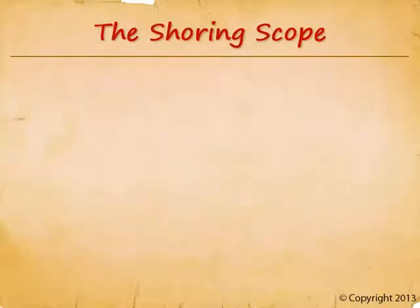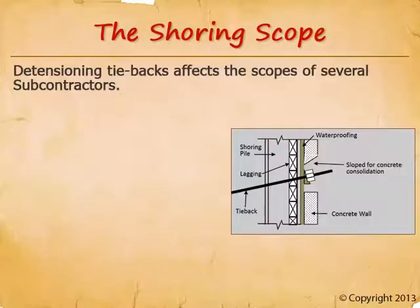Let's begin our training by talking about the shoring trade. Many cities and private owners require detensioning tiebacks, primarily because tensioned cables pose a safety hazard if hit when trenching in the future. Tiebacks are temporary structures usually provided by a design-build shoring subcontractor, so they won't be on the drawings. The shoring subcontractor is not the only party involved, so work needed by other trades won't be on the drawings either. When something isn't on the drawings, bidders won't include it unless specifically directed to — and this is where the bid instructions come in.